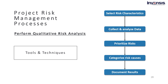Then, we have to prioritize risks by probability and impact on specific objectives. Some tools allow distinguishing a risk's priority in terms of the affected goals of the project. This specification will provide a list of risks that are important for any specific objective requiring immediate attention. This is useful since it is common for risks to have uneven impacts on various project objectives. We will also have to prioritize risks by probability and impact on the overall project — a common reason is for ease of communication with management and other stakeholders.